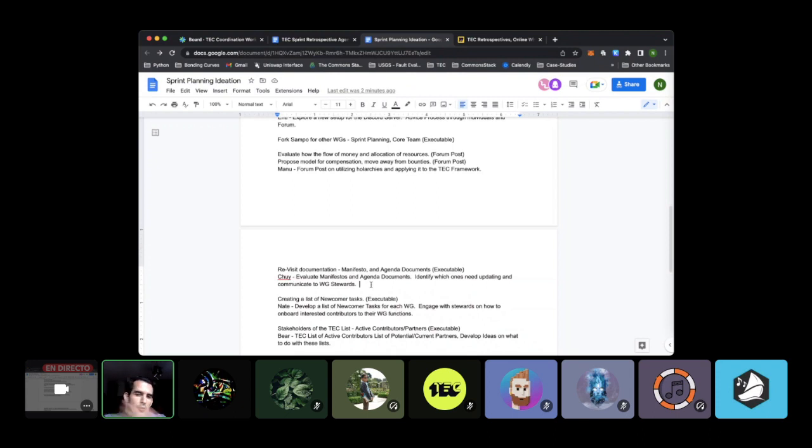Okay, and this is one of the things that I think we'll cover within the sprint retrospective. We'll go over each task that was taken on by us during the sprint, and we'll evaluate what else needs to be executed in order to achieve the goal we have within this idea, and we'll keep building onto it. So that is the concept of it. We'll evaluate exactly what we did, what went wrong, what the challenges and obstacles are, all that good stuff.